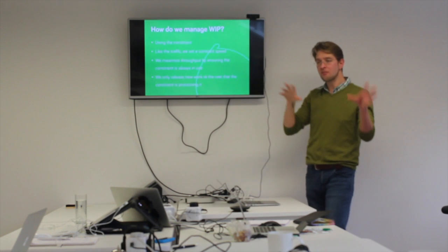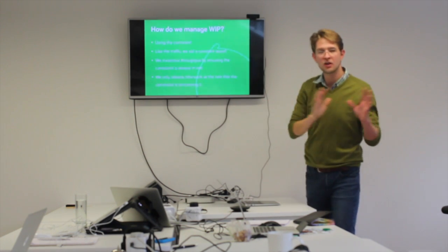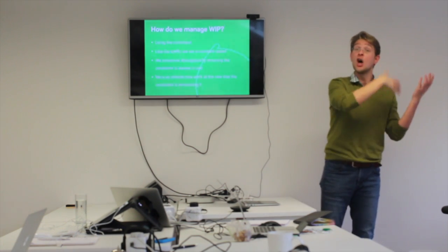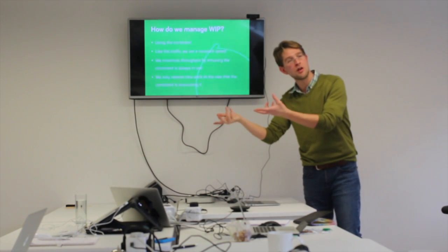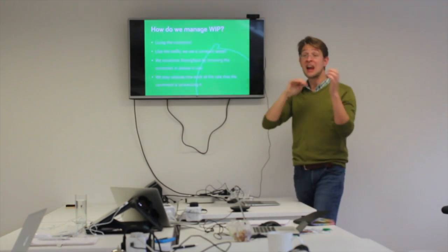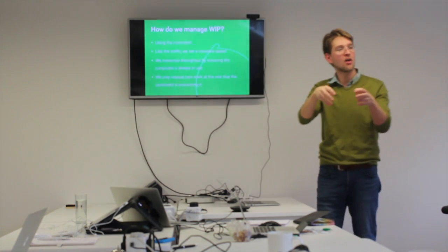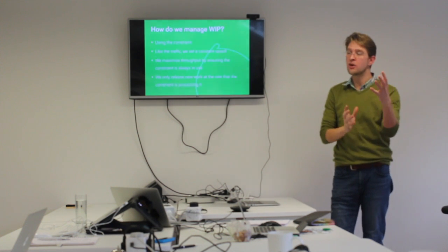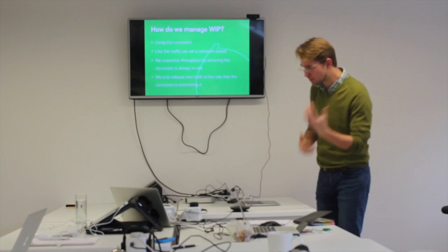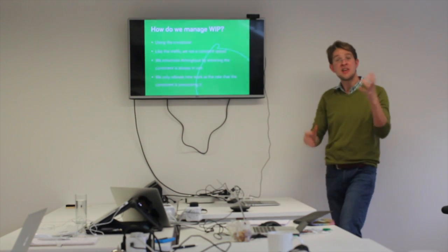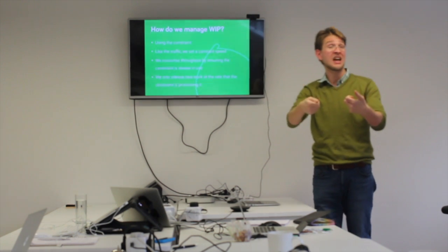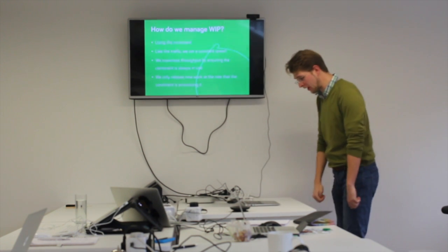Now, just to start to frame some of the GrantTree specific questions for us, I think this is really interesting. Because we have people who are skilled across multiple stages of the process, understanding where the bottlenecks currently are allows us to effectively allocate our time. So if there's one stage of the process which emerges as a clear bottleneck, where work is piling up in front of it, then we can say, well, this should be the priority stage. We should spend more of our time on this stage rather than on another part of the workflow.